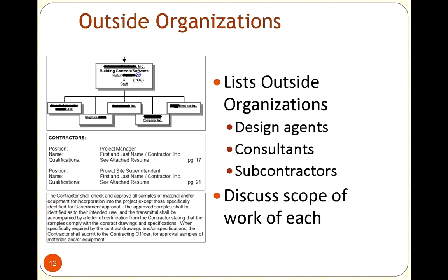So I would try to make sure to involve the primary contractor in addition to the secondary contractors, but it was always essential to make sure everybody understood, because if I translated something to contractor A, then I can't always guarantee that he's going to say the same things, enforce the same things, use the same language with contractor B. So make sure that you're discussing the scope of work with all of them and that you understand who they are and that they're qualified to do the work that needs to be done.